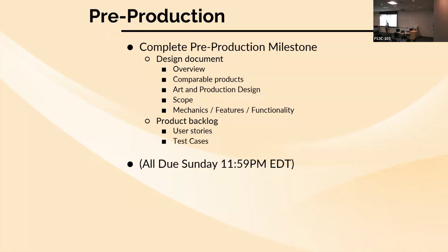In fact, this is probably the more important of the two. I'm not discounting the use of the design document, but if you want to have more focus on one versus the other, the product backlog is one that you're going to want to spend more focus on at this point, because we're going to be taking those user stories from the product backlog and using them for sprint planning in the future, right?